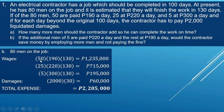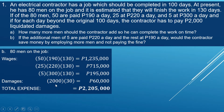For the wage of 50 men at 190 pesos a day times 130 days, that is 1,235,000 pesos. For 25 men at a wage of 300 pesos a day times 130 days, that is 195,000 pesos. For damages, since there are 30 days in excess of the contracted 100 days, we pay 2,000 pesos per day. So 2,000 times 30 equals 60,000 pesos.